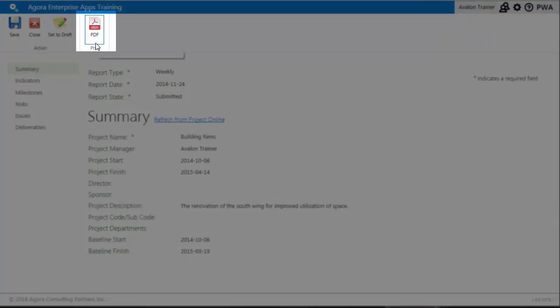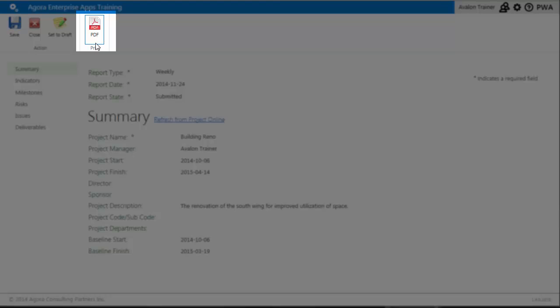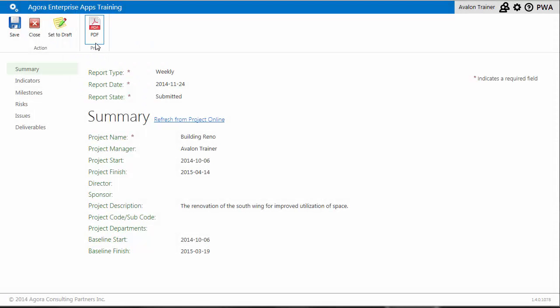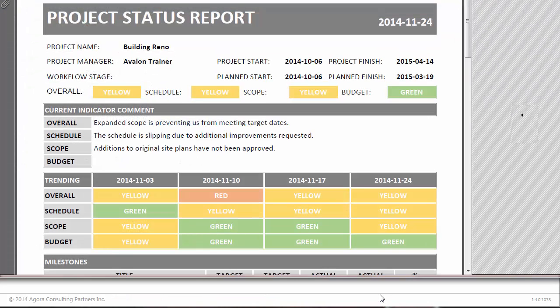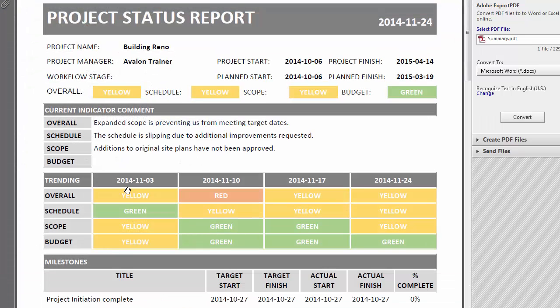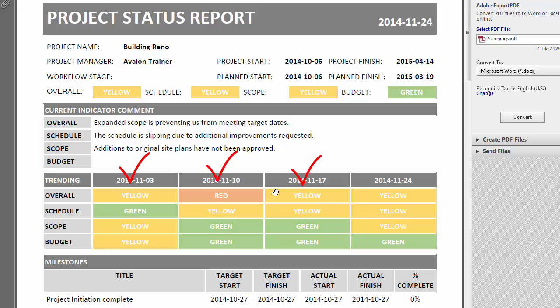The Status Manager app always generates a PDF for each report. This PDF will display trending over time. Once you click on the PDF and open the report, you can see the last four reporting periods to determine how the project is trending.